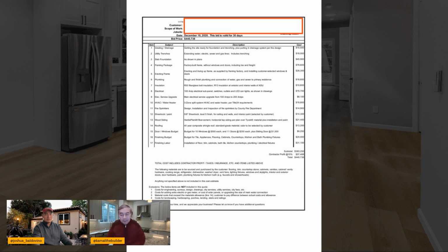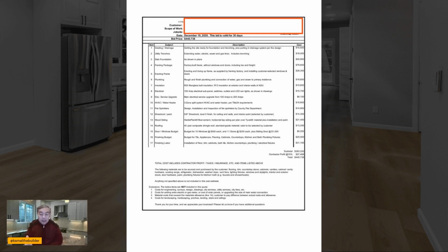But even now, our format of a bid is still the same. So basically, as you look at a bid from any general contractor, look for a few things. For example, here, you see that we itemize our bid. Against each of these items, we give you a cost number. So it's very transparent. For example, pick any one. Item number 6, plumbing. What does plumbing include? Rough plumbing and finished plumbing, and we give you a number there.